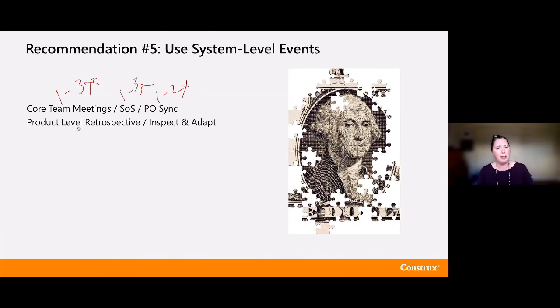My general recommendation to people is to do a product level retrospective either once a sprint or once a month. I think you need a regular rhythm that's fairly frequent at looking at this. That really comes from the fact that every time I've been in an organization where I work with 5, 6+ Scrum teams, I find a list about this big of what the Scrum teams need to fix, and a list about this big of what the organization needs to fix to enable the teams to be effective.